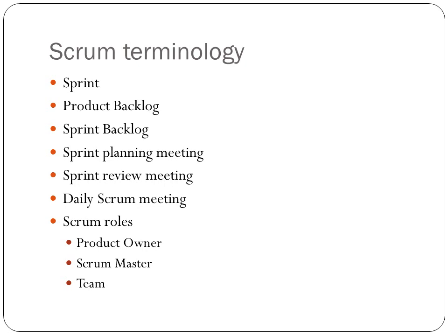Next comes Scrum roles. Here there are 3 roles. First one is product owner. He is from the business side. Next one is Scrum Master, who is responsible for clearing the roadblocks of the team members. Finally, the team, which includes the developers, testers and all other people of the project.